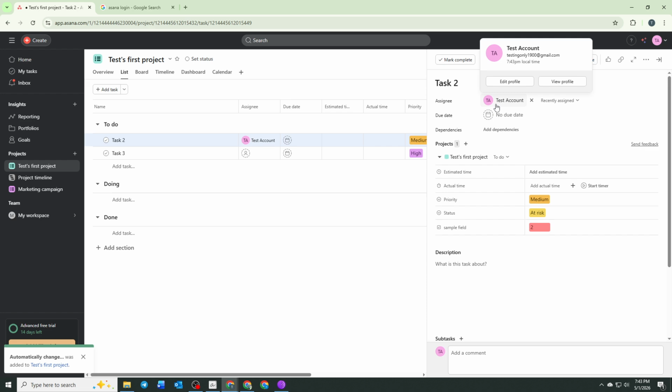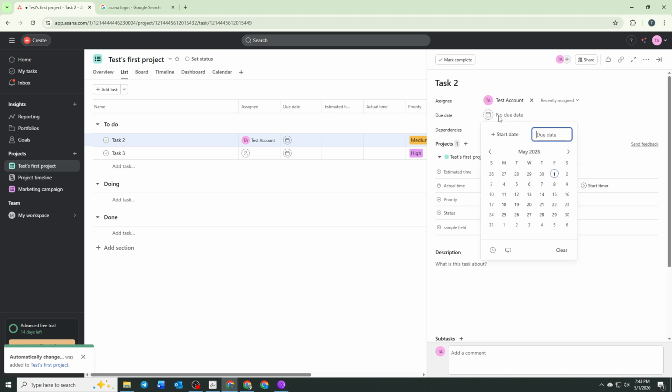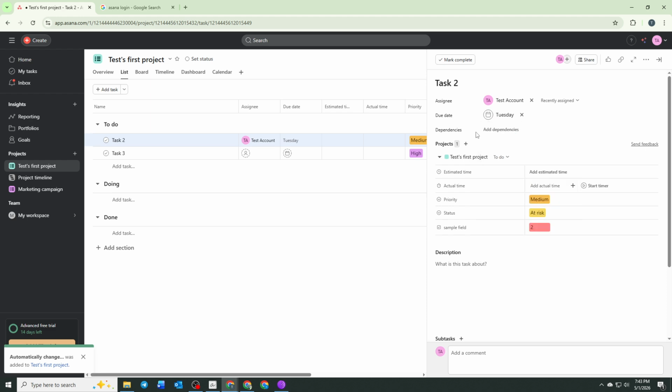For issues with deadlines being missed, it is important to consistently apply due dates to all tasks. Setting realistic timelines helps keep work moving at a steady pace. Encouraging team members to update deadlines when priorities change also keeps schedules accurate. Using the My Tasks view allows each individual to stay aware of what is due next, helping reduce last-minute pressure.